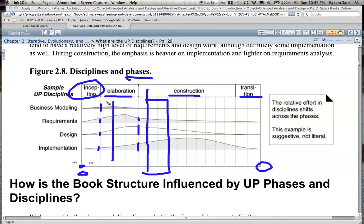Each one of those dotted lines may represent an iteration. The inception phase represents one iteration, and the elaboration has three iterations: iteration one, iteration two, and iteration three. Then construction has several iterations, and then transition covers transitioning the project from development to deployment. The number of iterations and the duration of each iteration is totally up to you as you design, analyze the problem, and decide how you're going to manage the project lifecycle.